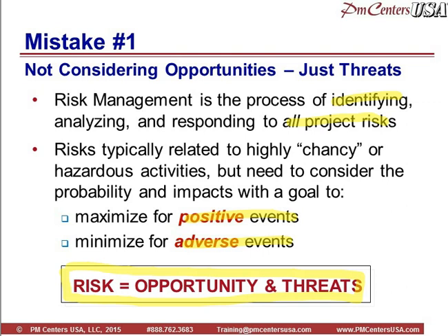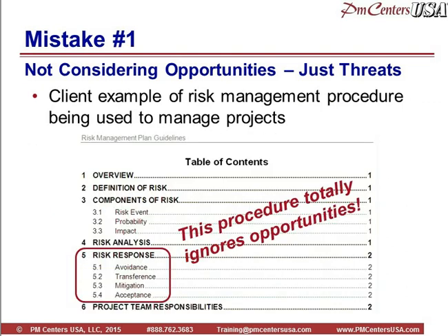And most organizations don't consider the opportunities, and that's a huge failing. What I'm showing here is a client that we worked with, and the good news, they did have a procedure for doing risk management, so congratulations on that. A lot of organizations don't. But the bad news was their procedure was all about the bad things that could happen on a project. There was absolutely nothing in that procedure about looking for opportunities and trying to take advantage of opportunities. So this is the point. Don't look at just the threats. Ask the question, are there opportunities on this project that we can take advantage of? Risk management really looks at both.